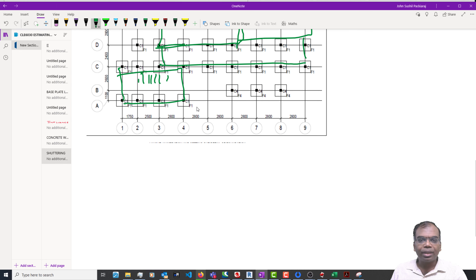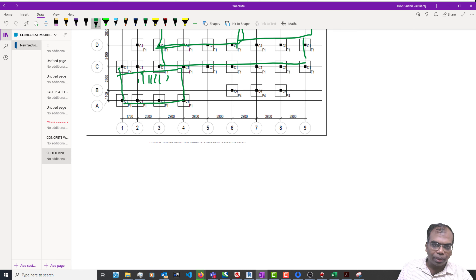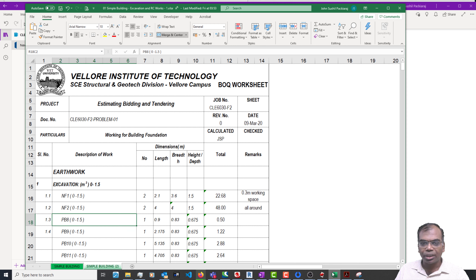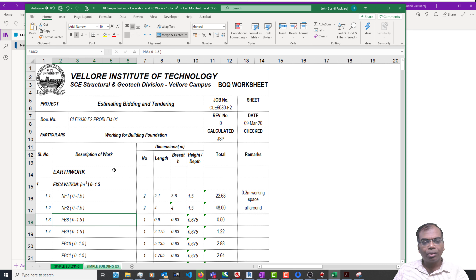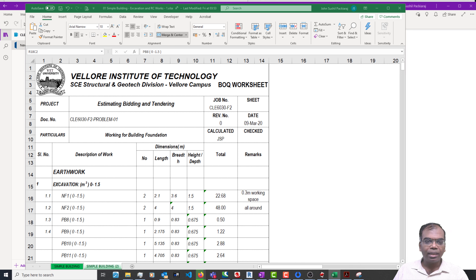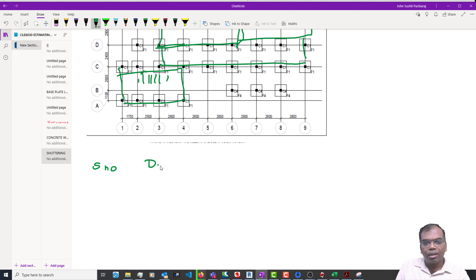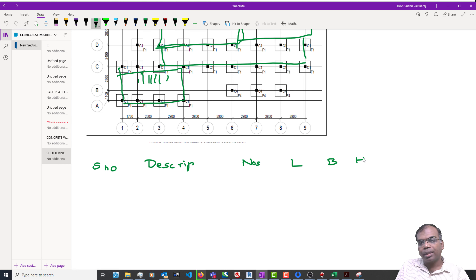As usual, you always try to use a standard BOQ sheet, and this is the standard BOQ sheet. You need a serial number, description, numbers, length, breadth, and height. Coming back here, you can keep serial number, description, numbers, length, breadth, and height. After that you can always have the quantity.